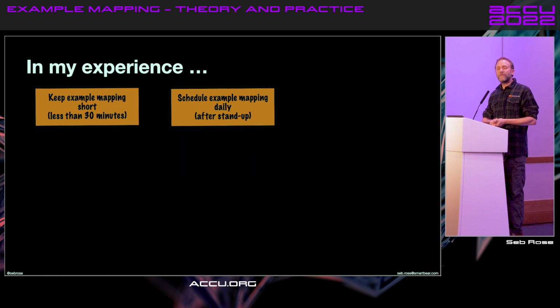However, if you find that you desperately need to get a new story refined and ready for work, and you have to then schedule a new meeting, you will be pulling your hair out trying to find time to get the right people in the room. So a 30-minute session scheduled after each stand-up has been my go-to approach.